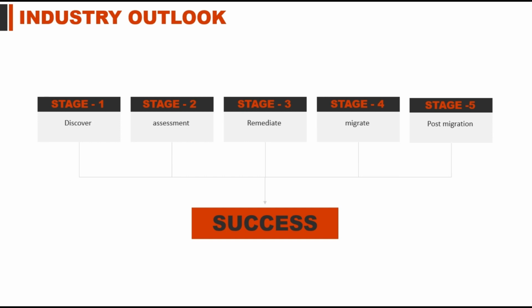Our teams generate some reports regarding the assessment or remediation. On the basis of that report, the customer needs to agree to the further migration process.